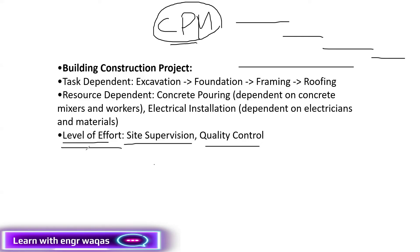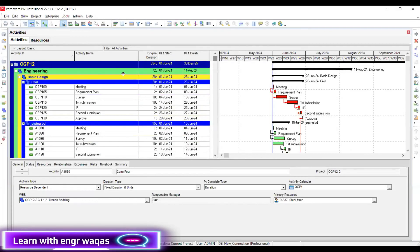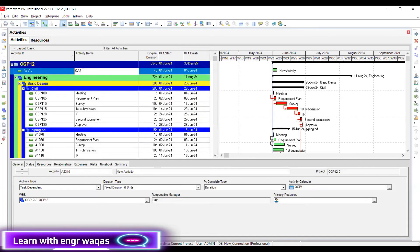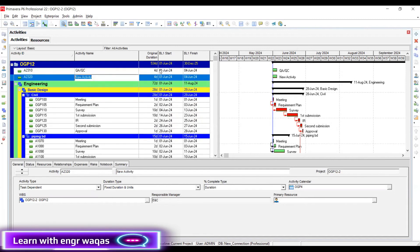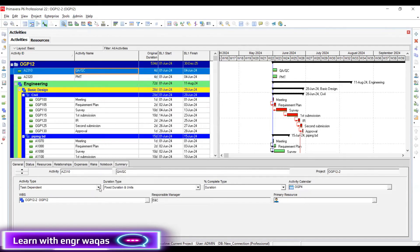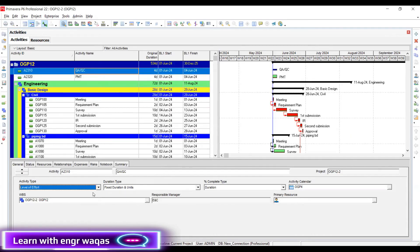Let me give you an example of how to develop them. Let's say my project manager or my client says that I have to write here: Quality Assurance and Quality Control. This team should be there in my project schedule, and the project management team should also be indicated and deployed on my project. The first thing is I have to go and make the activity type Level of Effort.